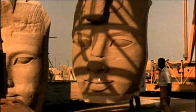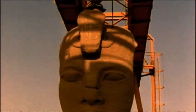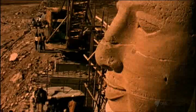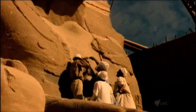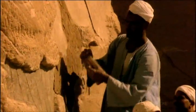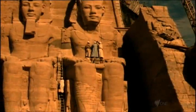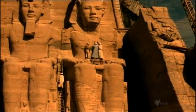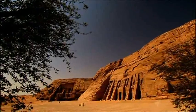The original move involved hundreds of delicate operations like this. It took an exhausting 19 months to completely reassemble the temples. Then they had to disguise their handiwork — there were 10 kilometers of cuts between the temple blocks that all needed to be filled with mortar to cover up any signs of surgery. On the 31st of October 1968, four and a half years after it had begun, and an astonishing 20 months ahead of schedule, the project was completed.